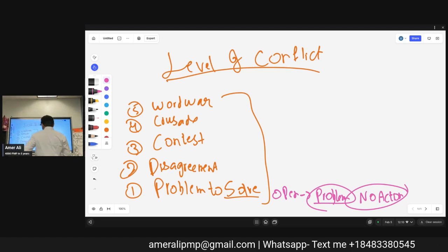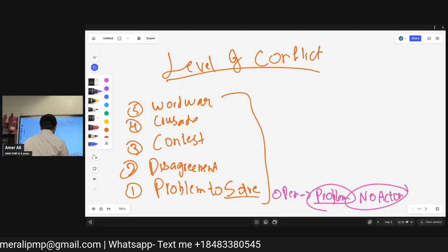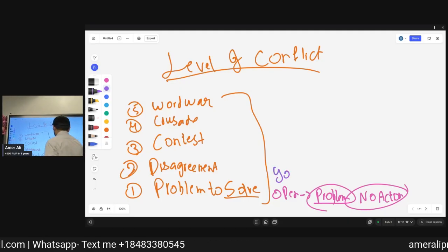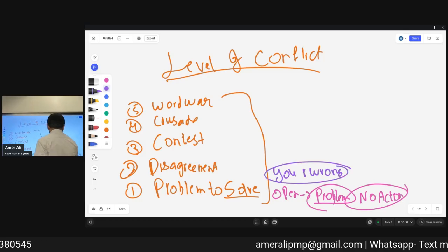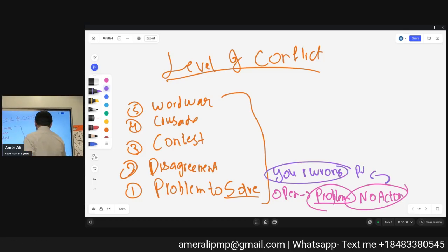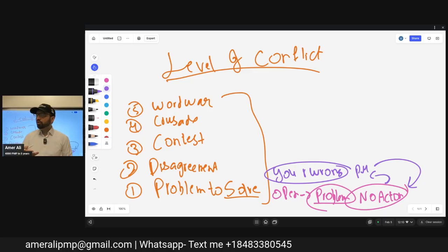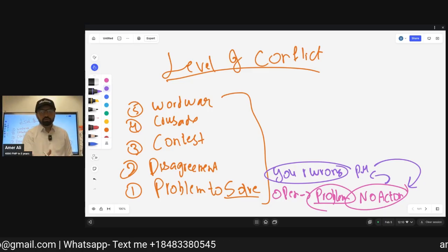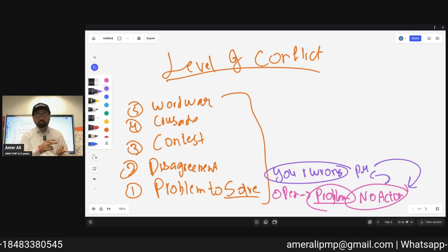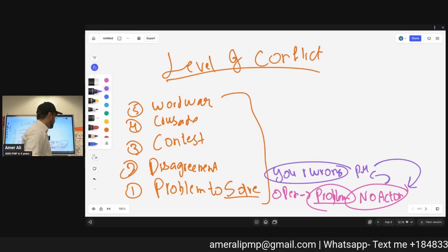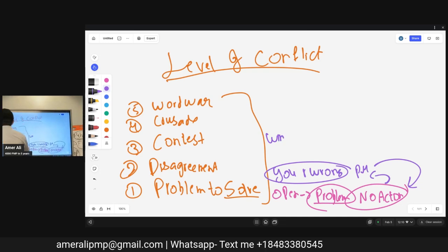Disagreement. Now, we move from a problem to a disagreement. We say that you are wrong. We straightforwardly put it that you are wrong. At this level, the PM should jump in and try to discuss and de-escalate it, so that this is not about him or you, it's about the problem here. So let's go back and discuss the problem. We move from disagreement back to problem. If not, it moves to win-lose.